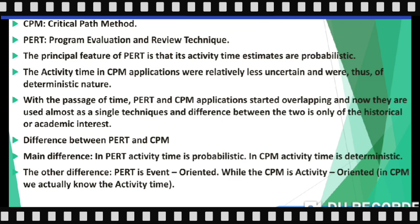In CPM applications, the activity times are relatively more certain and thus are deterministic in nature. In CPM, we know about the finishing time of different activities — that's why their time estimates are deterministic. This is the main difference between CPM and PERT: in PERT, activity time estimates are probabilistic and uncertain, but in CPM they are deterministic.